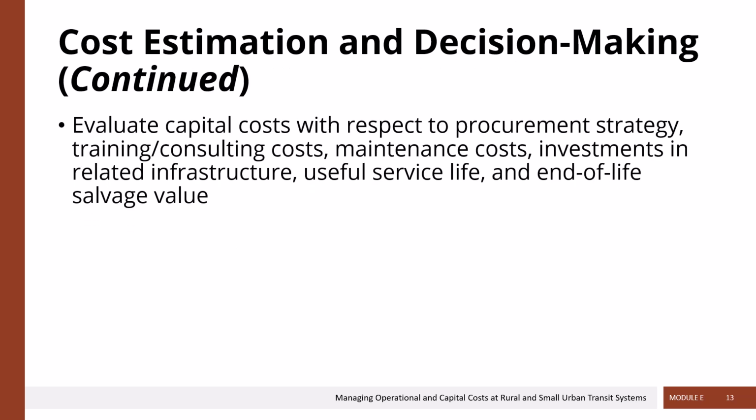So when you're looking at capital expenses and trying to estimate the cost of a capital project, whatever you're buying or building, it's important to estimate what those costs may be. And that estimation process needs to take into account the procurement strategy you're planning to use, any training or consulting costs that might be associated with the acquisition of that asset or facility, any sort of maintenance cost that's going to occur not only upfront but over the long term. Is there any other investments that need to be made in order to support that capital asset?